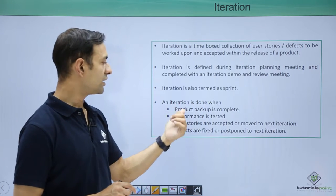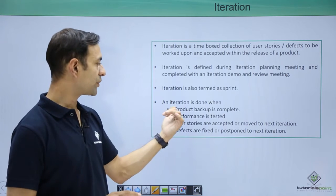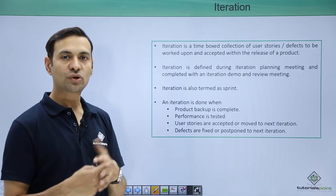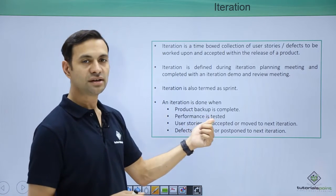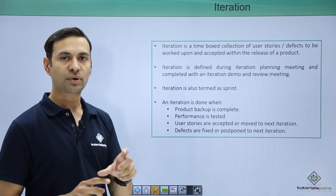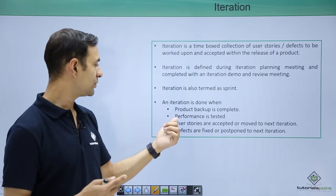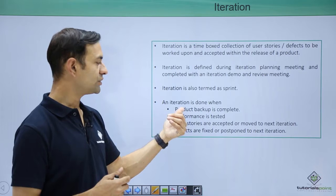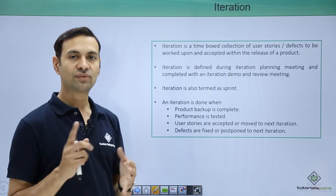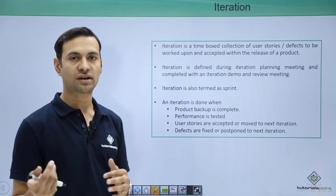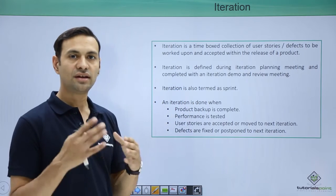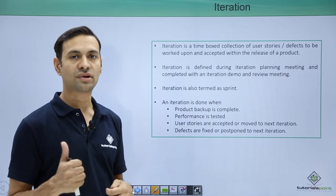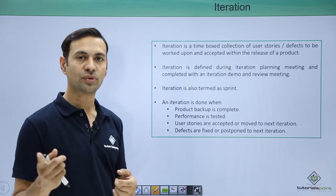Iteration is defined during iteration planning and completed at iteration done, where review meetings are held. An iteration is done when certain criteria are met: the product backlog is complete, performance is tested to check whether we are meeting the required performance criteria, and user stories enclosed within the iteration are accepted. If not accepted, they should be moved to the next iteration.